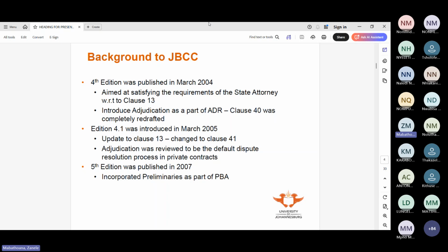There's also, if you think about your bill of quantities, Section 1 of the Bill of Quantities is your preliminaries, which speaks to the contractor's overheads. So things like the site office, contractor's traveling, salaries for his admin people, head office costs, all of that sits in your preliminaries.